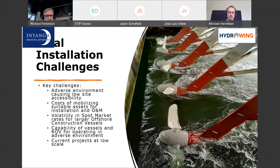I think some of the key challenges, obviously, with this environment is the adverse environment, which is needless to say why we're there. The cost of mobilizing assets. Unlike Jason, we don't have marine assets. We hire them in for the project, depending on where we're going. And then obviously, we're using a lot of vessels from the oil and gas industry, which is very volatile. And the past few years has been very depressed. However, this year it suddenly picked up again, and oil and gas vessels are in very high demand and very